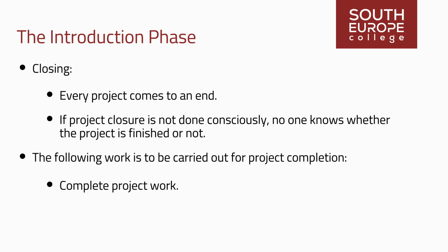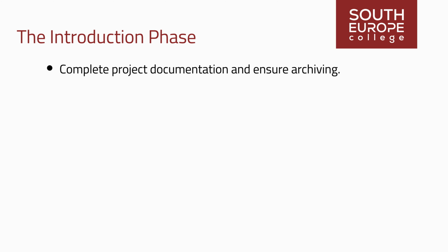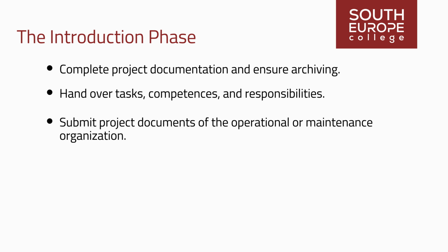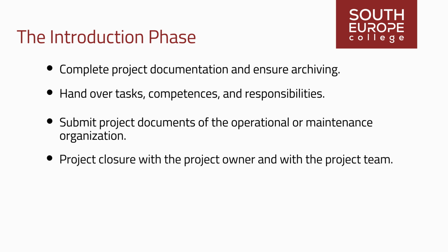Complete project work. Clearly assign and schedule possible remaining work, or postpone it to a future release. Elaborate final account. Complete project documentation and ensure archiving. Hand over tasks, competencies, and responsibilities to the users or an operating organization. Submit project documents of the operational or maintenance organization. Project closure, with the project owner to hand over the project, and with the project team to dissolve the team.